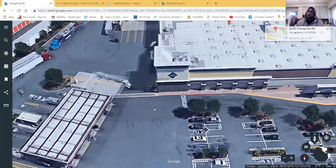If you just plan on going in there and banging this thing out, you're not going to get that job, because every other contractor that's bidding on this understands the flow of construction, the order of construction, that it'll be night work. They may need to pay a little bit additional. They can only do a certain amount of work during a certain amount of time. This may only be available during a certain part of the project. Things like that. I have the advantage because I've done projects like this before. I know it's night work, and I know I don't have a whole lot of traffic, so I kind of know I have free range of doing things.